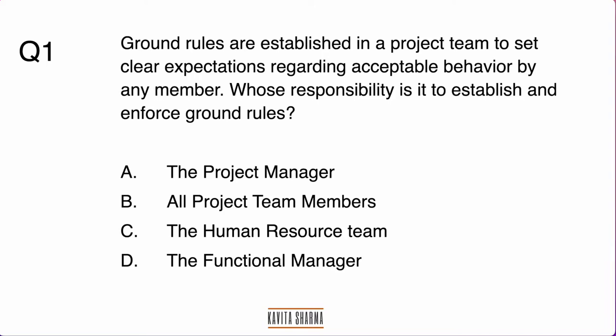If one of the members comes late, we fine them, and at the end of the month we collect all the fines and go for a party — that's a ground rule I had while working at one company. If you said the project manager, that would be wrong. The responsibility to establish ground rules belongs to the team members.